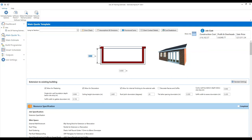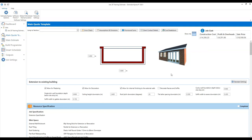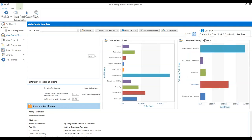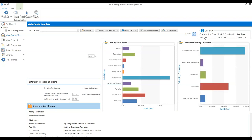If we keep the projection of the extension at three metres and change the width to five metres, you'll see that when I click elsewhere on screen or press enter, the job costs on the top right-hand corner are recalculated — that's why the software pauses for a moment. The dimensions entered will be used to calculate the length of walls, various roof dimensions together with the pitch, the area of the floor, the internal area of the walls for plastering and decoration, the ceiling dimensions and so on. The software is intelligently inserting those dimensions wherever they're needed throughout the estimate. The construction cost excludes any profit or overheads; profit and overheads are shown separately, and the sale price is the price to the customer including overheads and profit markup.